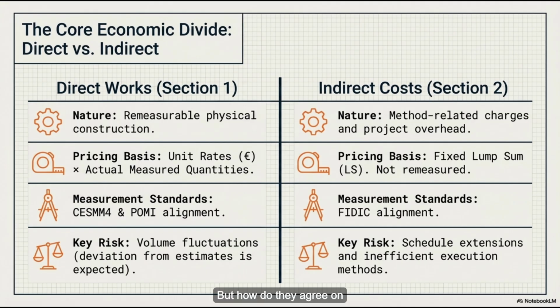Right. But how do they agree on what constitutes a measurement? Well, to ensure everyone is speaking the exact same language, the document aligns with CESMM4, which is the Civil Engineering Standard Method of Measurement. Exactly, as well as POMI, the Principles of Measurement International. Okay, this is where it really clicks for me.